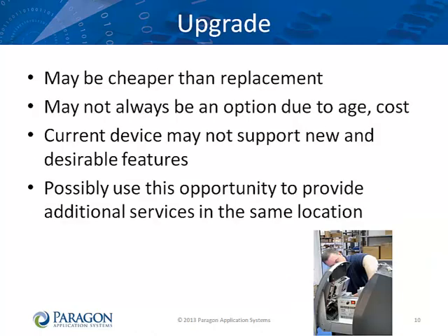Upgrading an ATM is typically cheaper than replacing it, but upgrading is not always an option. Older ATMs may be very expensive to upgrade due to the scarcity or cost of components. Your current terminals may not support all of the new features you want to offer. You may be able to use the EMV project to replace a device with one that provides more services in